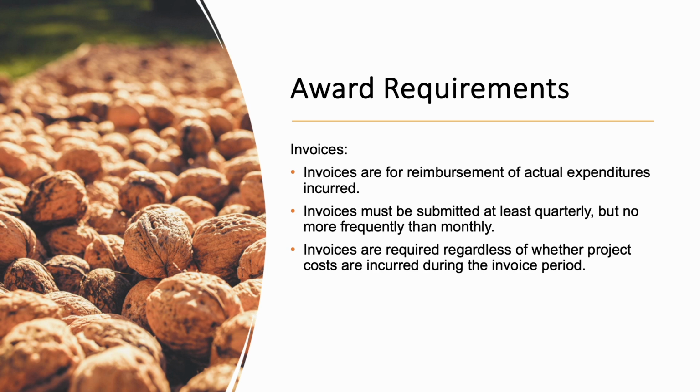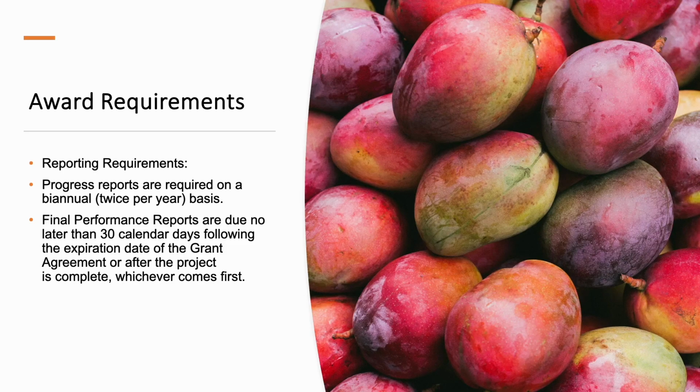Invoices are for reimbursement of actual expenses. Invoices must be submitted at least quarterly, but no more frequently than monthly. And invoices are required regardless of whether project costs are incurred during the invoice period or not. In addition, applicants awarded funding must submit progress reports on a biannual basis and final performance reports no later than 30 calendar days following the expiration date of the grant agreement or after the project is complete, whichever comes first.